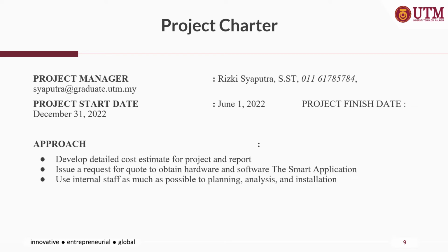Following up is the project charter for our smart hospital system. Our project manager is Rizky Shaputra, and we plan to start this project from the 1st of June till the end of this year, which is 31st of December. Rizky will develop a detailed cost estimate for the project and report, and issue a request for quotation to obtain hardware and software for this project. He also requests help from internal staff as much as possible to plan, analyze, and install this system.